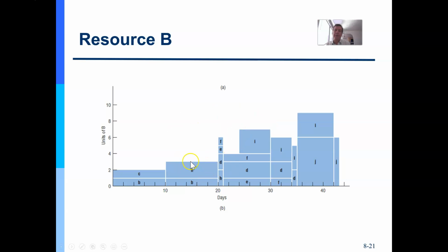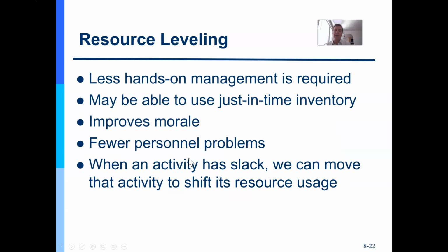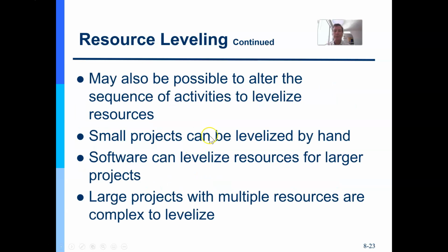Here's another view of that same issue, which would require some of that leveling or smoothing along the way, right? And so resource leveling is going to improve morale and create fewer personnel problems along the way. Especially when an activity does have some slack, we can move that activity to shift. So if I have slack on an activity, some float, some extra time, I can move resources to activities maybe that are on the critical path. That would be resource leveling.